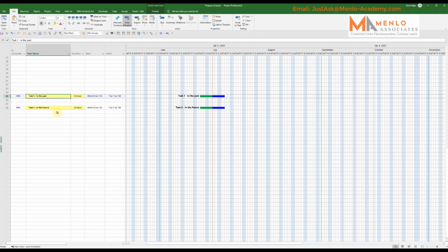Now, as you come closer to the end of the job, all of this amount of slack is being reduced by various circumstances, and it's all becoming more condensed as you get closer to the end. The effect of this job starting late could knock something later in the job over into critical, and it could form the basis of an extension of time claim. One of the key arguments you always get back from a client to try and refuse an extension of time is to say, well, if you'd have started the job here when it was supposed to have been started, you wouldn't need the extension of time because it wouldn't have been critical, etc.